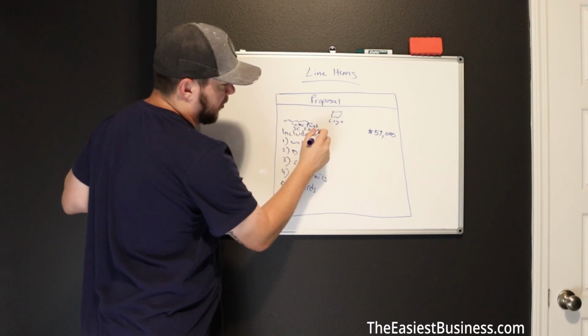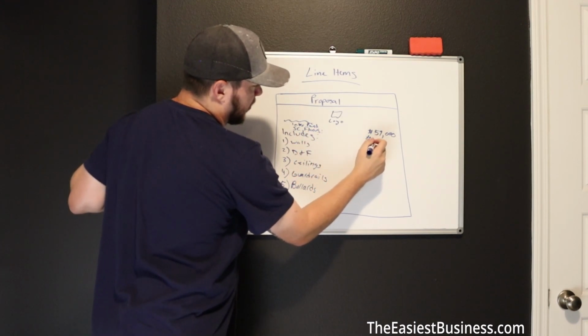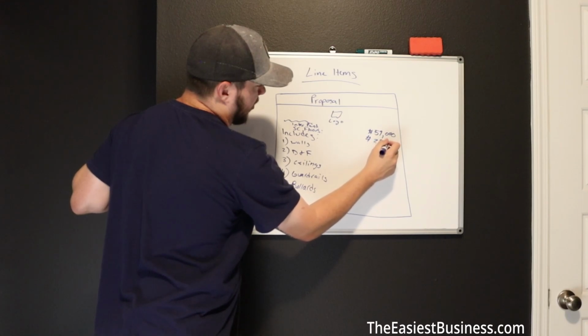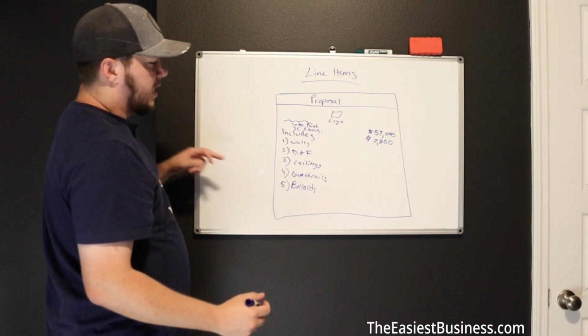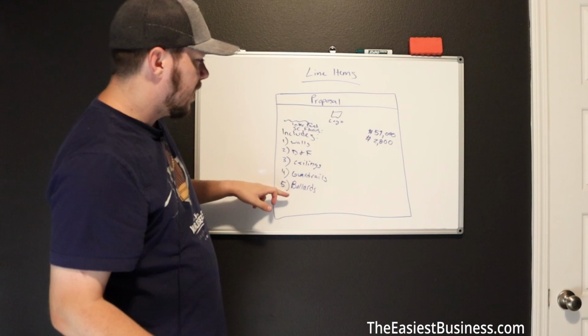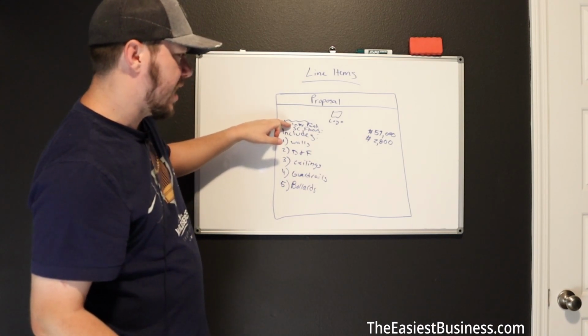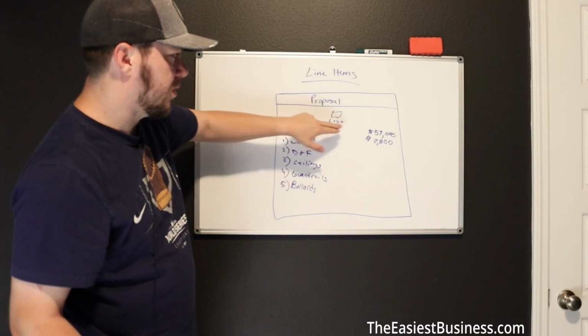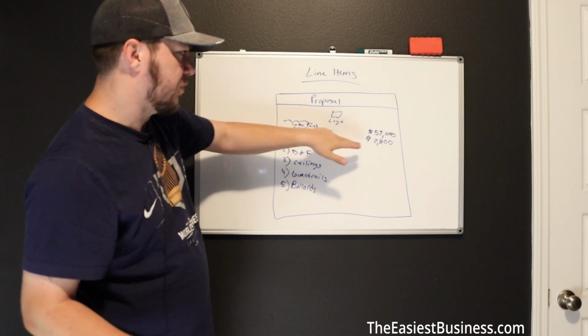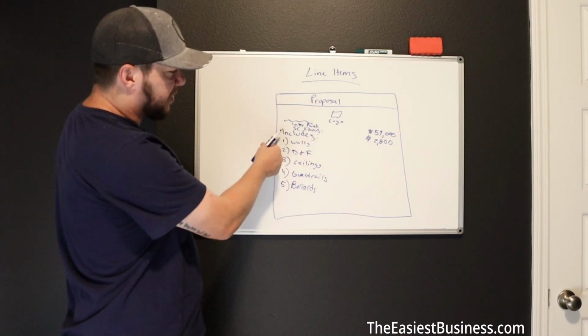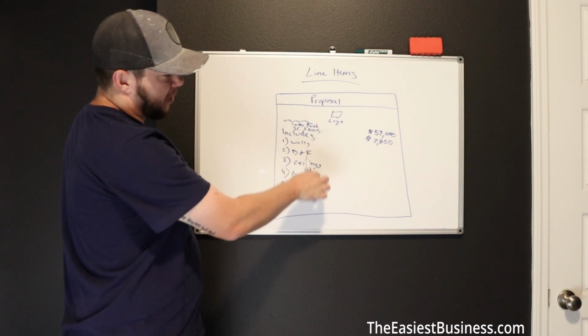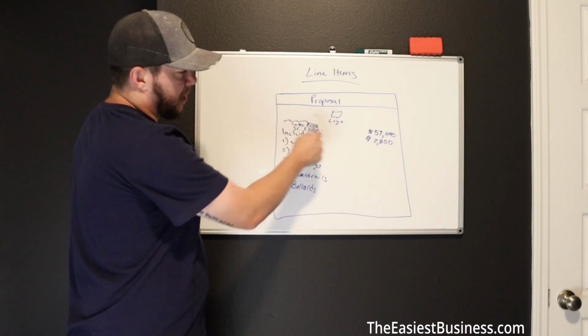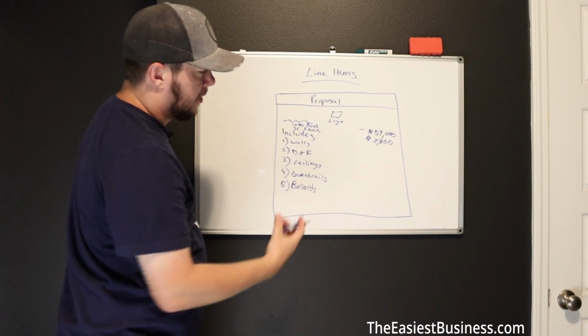Sorry, I don't have a bunch of room. And there may be $2,800 in sealed concrete floors. So anything that's not included on here, but as you know, gets painted, like an add alternate, you want to do right up under your total number. So you want to do like interior painting, 59,000, sealed concrete floors, 2,800. And then I have an include section, which is going to have every line item that I included in my main bid here.